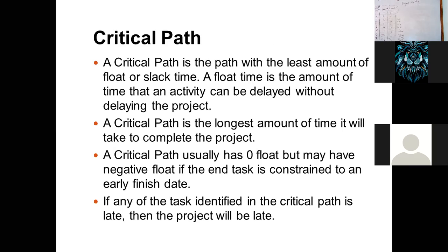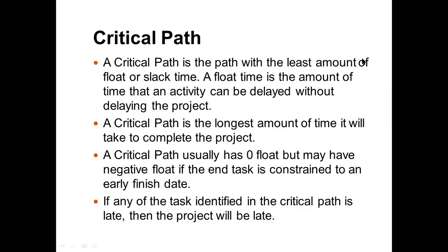Suppose we have activity C and it is taking 3 weeks. That is the maximum time. Float says that it can be delayed without delaying the project. The maximum time we can delay a particular activity without delaying the project. But how will we know how long the project is? Suppose the whole project is taking 20 days. So we need to define that for a particular activity we can extend it this much, but the 20-day date will not move. It will be one date.